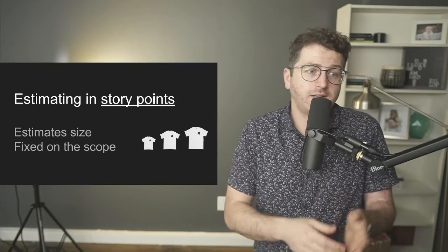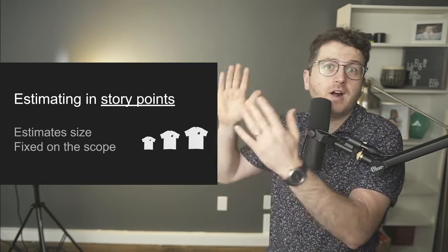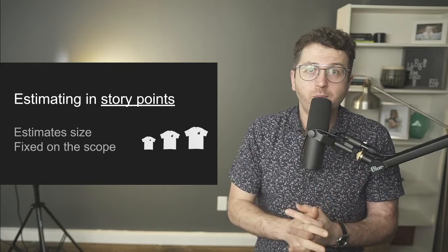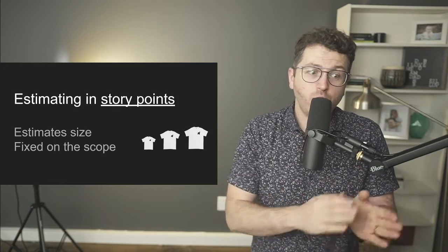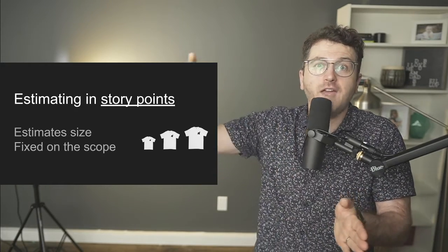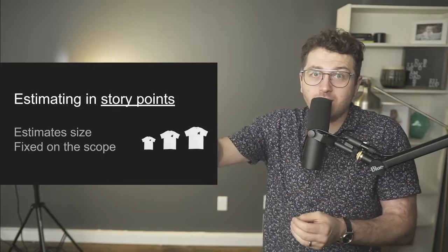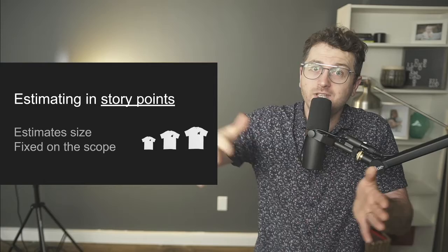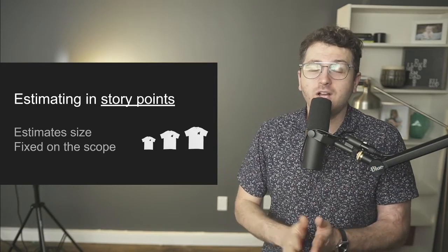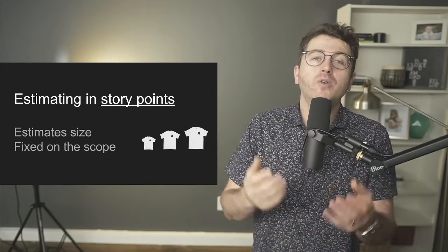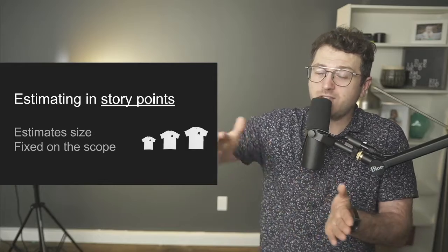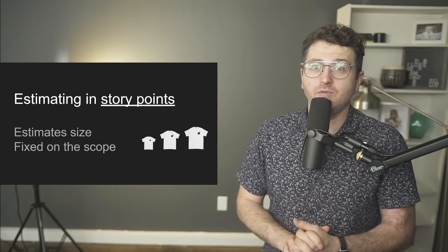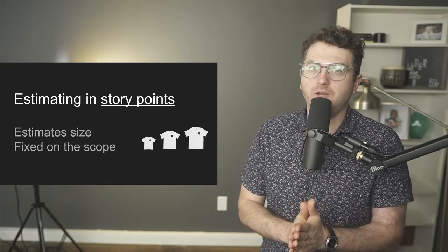That's why the estimation is not like 1, 2, 3, 4, 5, 6, 7 story points, but it's like Fibonacci: 1, 2, 3, 5, 8, 13, where the last number is the sum of the previous two numbers, and basically the gap between the numbers is larger. Now, another story point estimation is the powers of 2. And kind of the same way, the gap gets bigger and bigger over there. It's kind of the same principle anyway.